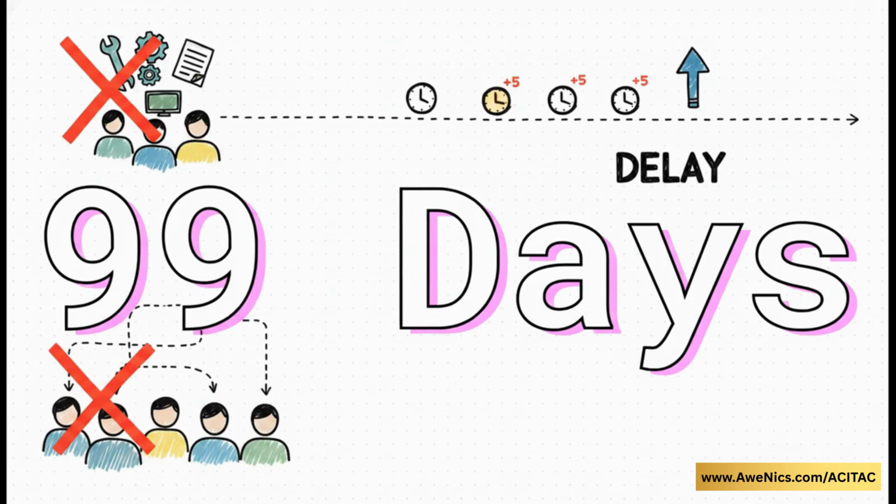And here is the new reality: 99 days. By running that leveling process to respect our actual real-world resource limits, our finish date has officially been pushed out. We've just added a full 5 days to our project duration. Because those critical activities literally had to wait for resources to become available, the entire timeline had to stretch.